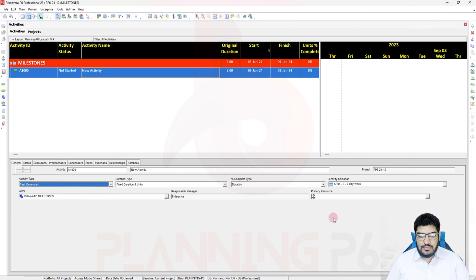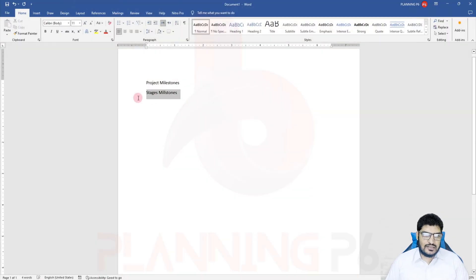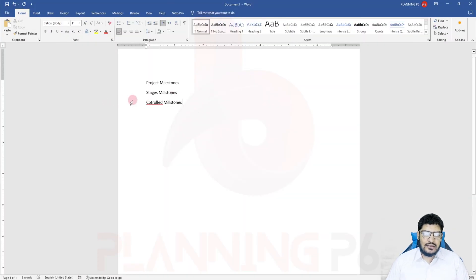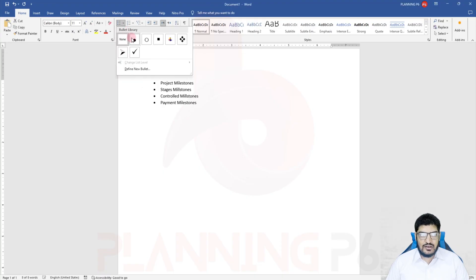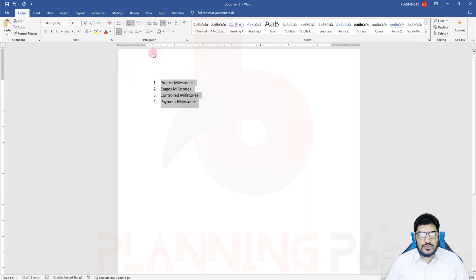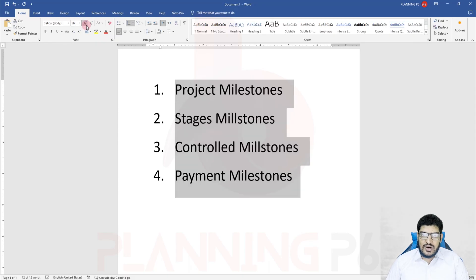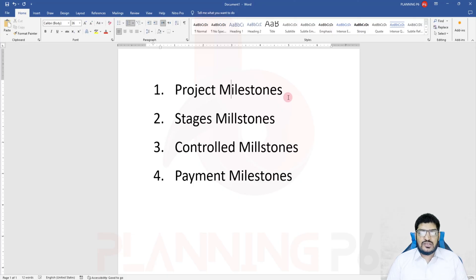In the project we use different types of milestones. First of all, the project milestones, then stages milestones, then control milestones, and then payment milestones. It does not matter if that is mentioned in your contract or not — you can use milestones wherever needed. For example, if the client requires that you must add the project milestone, then in the master schedule with five projects you will add the project milestones.